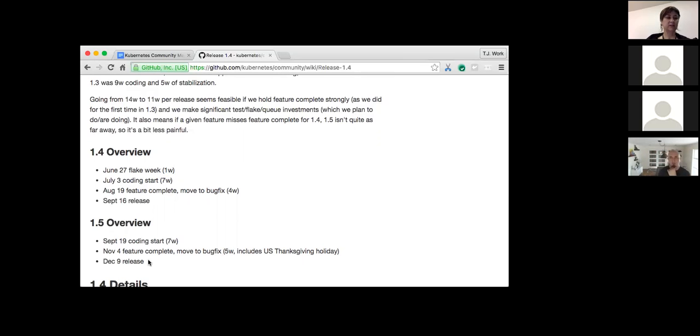We had been talking more broadly about moving to a time-based release as opposed to a feature-based release. Is that really the proposal here, by saying we're going to do 2 more this year, that we will do the 2 more? That's the presupposition, as you said, and then we will fit the features that fit into them as they come, and then they will slip. Any feature that doesn't make the release cutoff will slip to the next one.